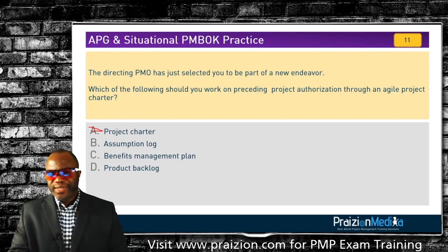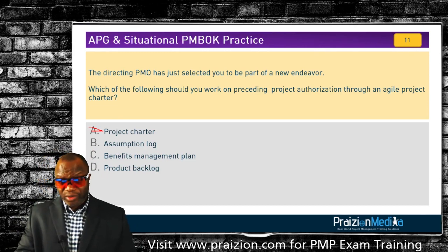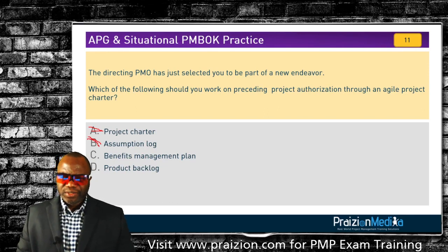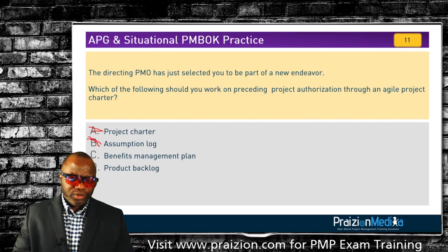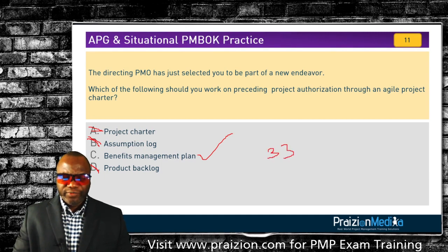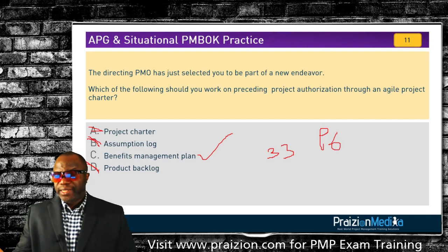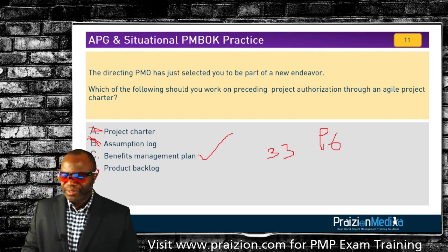What should you work on before authorization? Should you work on an assumption log before authorization? No, we typically do that after authorization. All right, so you've got a couple. You've got the benefits management plan, you've got the product backlog. Think about it. Would you work on a product backlog before the project is authorized and moving? No, you wouldn't. However, you might think about the benefits management plan. This is what you can find on page 33 of the PMBOK Guide 6th edition. And that is why the answer is benefits management plan.